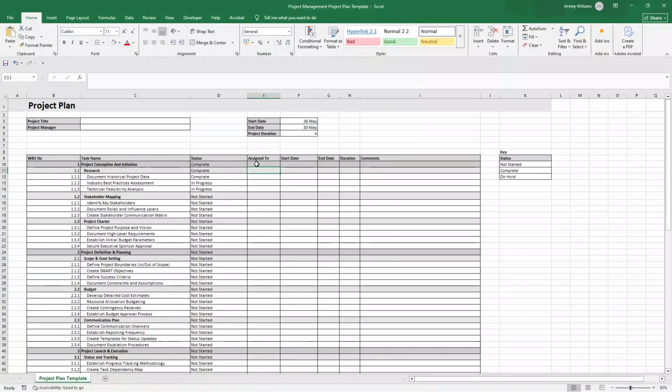Now, during this stage, we touched upon accountability. Confirm exactly who you need on your team. So find out if you'll have full-time or part-time people on the project and understand how their project work impacts their regular responsibilities. So the subject matter experts on your team are essential for delivering project success. So clarify their availability up front with their managers.